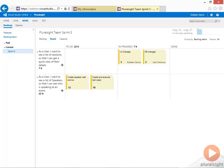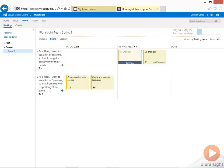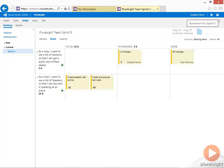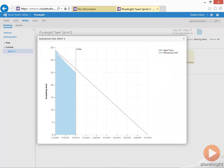From here I can change the number of hours I have left on a task. For example, I might have only three hours left in this one task, or I can also move a task to done. As I have made changes to these tasks, my burn-down chart gets updated with my current progress.